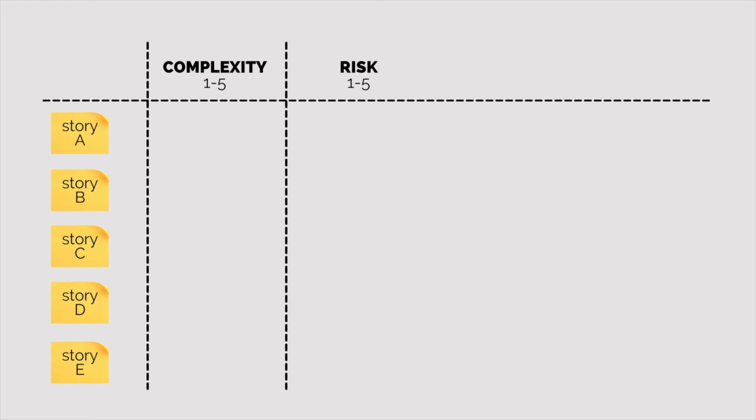The second criterion that we rank our stories on is risk or unknowns. This includes dependencies, rework, fixing defects, incorporating stakeholders' feedback, as well as time spent waiting to be able to do the work. The third criterion is the effort, which, as we all know, is the time required to code, test, and validate the code.